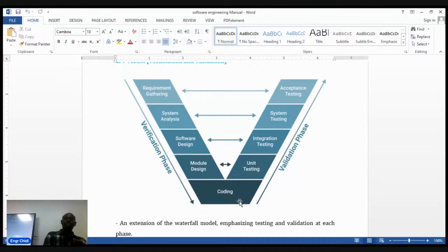After doing that, they will still do what is called acceptance testing. This acceptance testing is when they go to the owner of the software and say, use it. Or the users, who may not necessarily be the owner, but let them use it. As they are using it, you are watching how they use it. You are getting feedback from them. You're asking them questions. This software, how do you see it? What is hard? What do you not like? What do you like most? You check it from them. Are they encountering any error? You pick those points. Remember, we are talking about development life cycle.